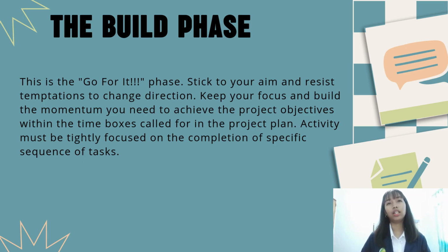In this phase, the project effort really ramps up. The full complement of people is brought on to fill out the project teams. Because of this, the weekly cost or burn rate on the project also rises significantly in the build phase. So, unlike the previous two phases, the cost of false starts and wrong turns now adds up very quickly.